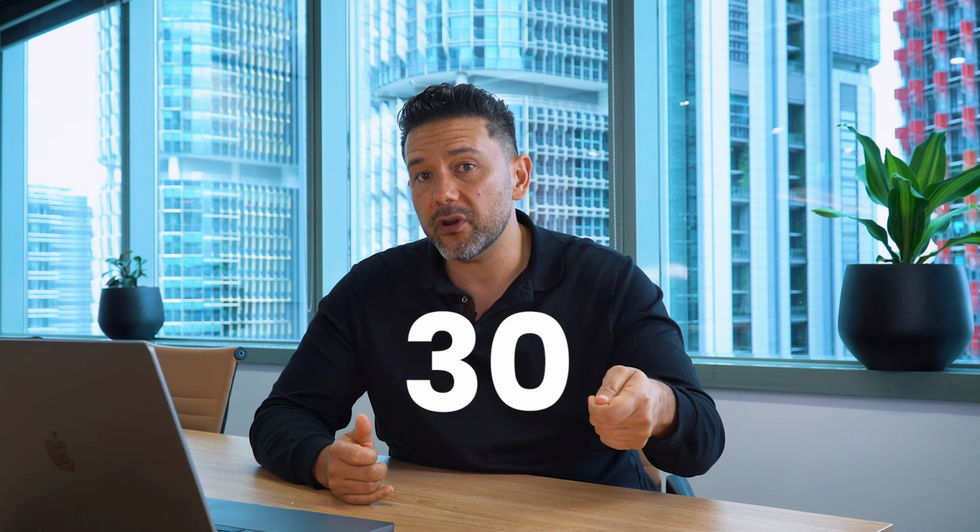But if you do sign a contract with these loopholes, you could begin construction and the builder may come back to you during the construction process and want to charge you another $10, $20, $30, or $40,000 or more on top of the price that you believe that you had to pay. This can blow out your budget and turn this beautiful process of building a new property into a nightmare. So be very, very careful of non-fixed price contracts.